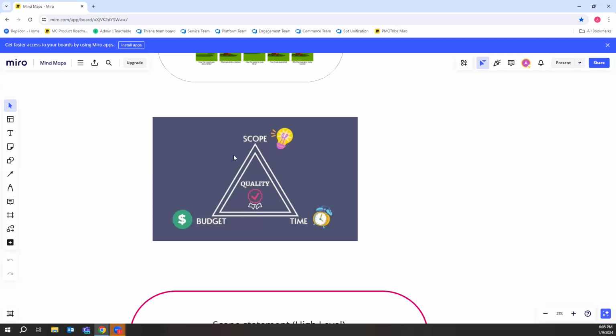An example of this would be the construction of a building, right? The building is the building. The scope is fixed. This is the building we are creating. It has 50 floors, so many levels, so many bathrooms, so many whatever. That scope is fixed. Depending on what we find as we start building might determine how the budget needs to change or how the time needs to change.